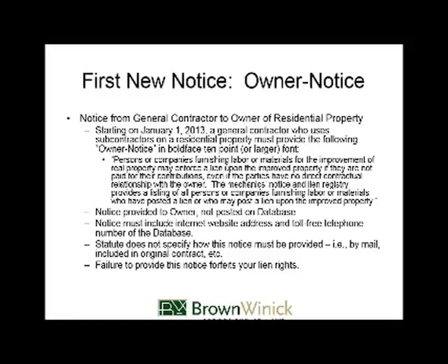The Mechanics Notice and Lien Registry provides a listing of all persons or companies furnishing labor or materials who have posted a lien or who may post a lien upon the improved property. Now, the purpose of this notice is to put the owner on notice that things called mechanics liens could be filed. And it tells them where to look. It directs them to the Mechanics Notice and Lien Registry, what I call the database.